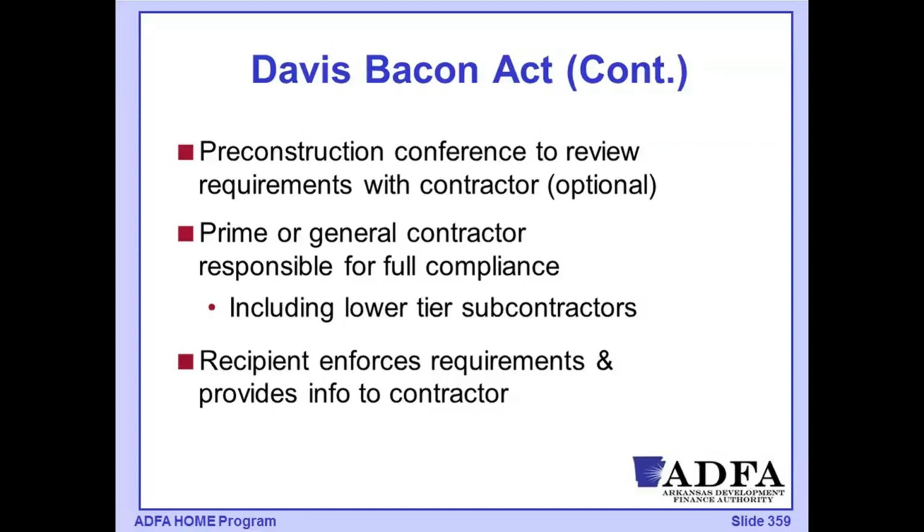So interviews would be conducted at the job site with a worker, identifying who they were, what job duties they were completing, and then comparing that to the certified payroll that has been provided. So that all would be discussed as part of the pre-construction conference so that our contractors, the subs, and staff all knew what the requirements were as part of that process.